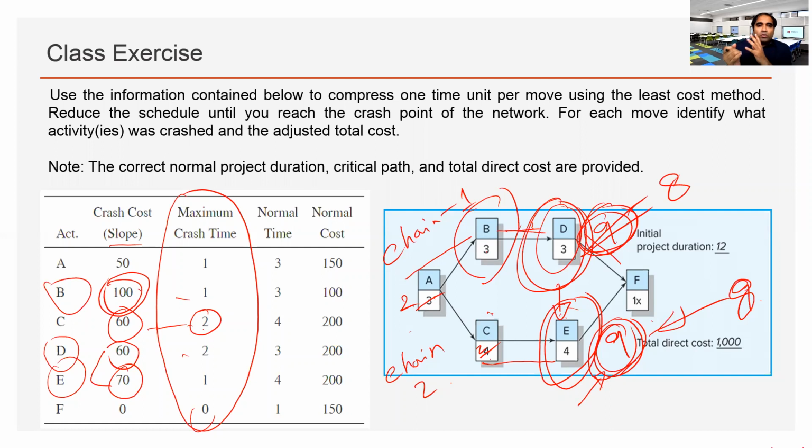The more information you have, the better it is for the top management to decide. Do all the chains need to be critical at the end? Is that necessary? That's why in the previous slide we discussed that it induces some additional risk. That means we have more critical chains, so there is a risk factor obviously involved.